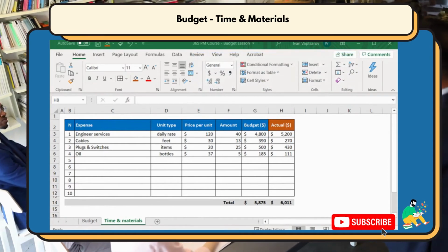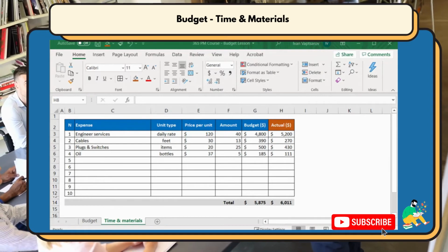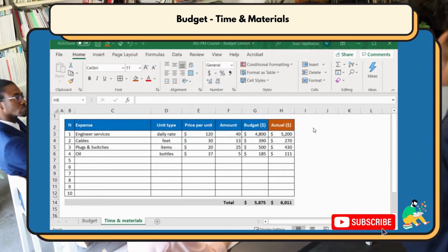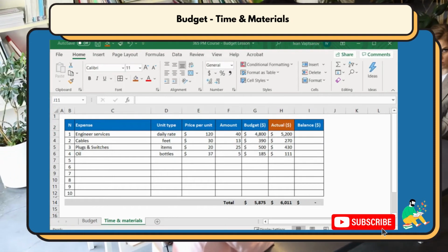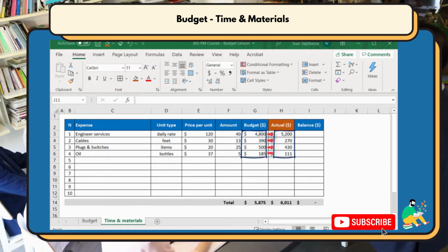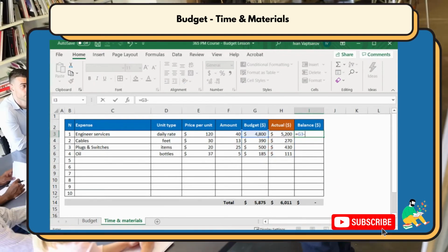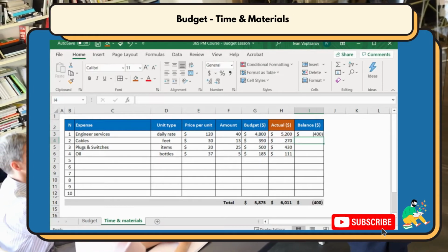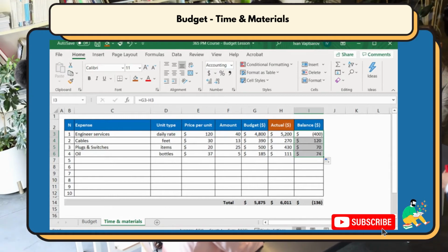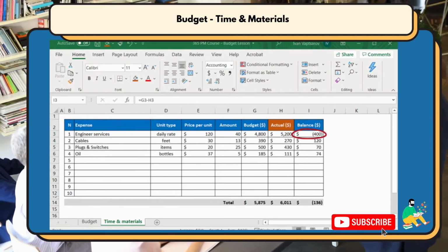The final tip we can give is to add one more column, where you can highlight whether the actual amount is lower or higher than the budgeted one. In this balance cell, you need to add a formula to calculate the budgeted amounts minus the actual amount. Logically, if the difference is negative, that would mean you have spent more than the budget.